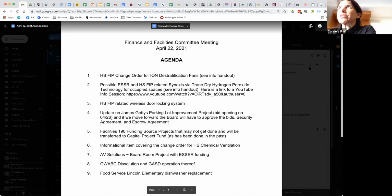With the sole source vendor, what Belinda's referring to, there has to be a letter provided by the company to indicate that they are unique in this field, and that this is one of the only options to purchase this item from. Thank you for considering those two things.